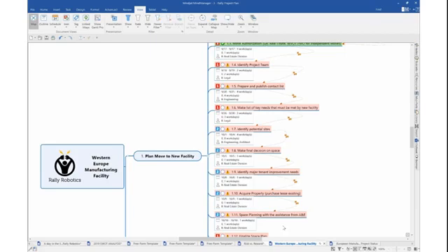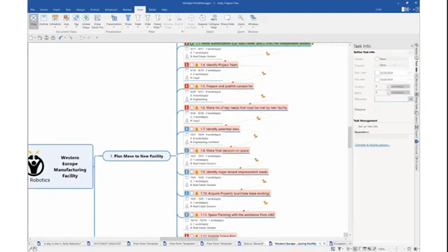In this release, we've enabled effort-based planning. So if I take a topic, I'm going to talk through this really quickly. I'll open up the task information. In this example here, we have one task with one resource that's going to take 2 days, and it calculates as 2 days of effort.